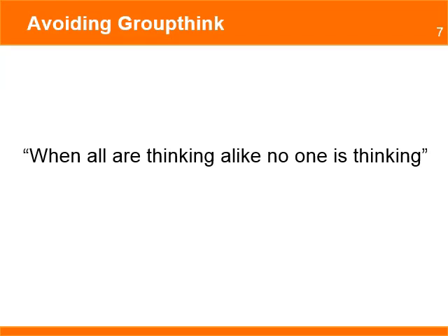Groupthink is a situation where the group is very homogeneous and is so concerned with maintaining unanimity that they fail to evaluate all the alternatives and options during a decision-making process. It's a situation where all participants in the group avoid disagreements and seek to achieve unanimity without considering alternative opinions or points of view, which can lead to bad decisions. To avoid this situation, the project manager should encourage diversity in opinions, foster original thinking, and even seek external input from other projects or units in the organization.